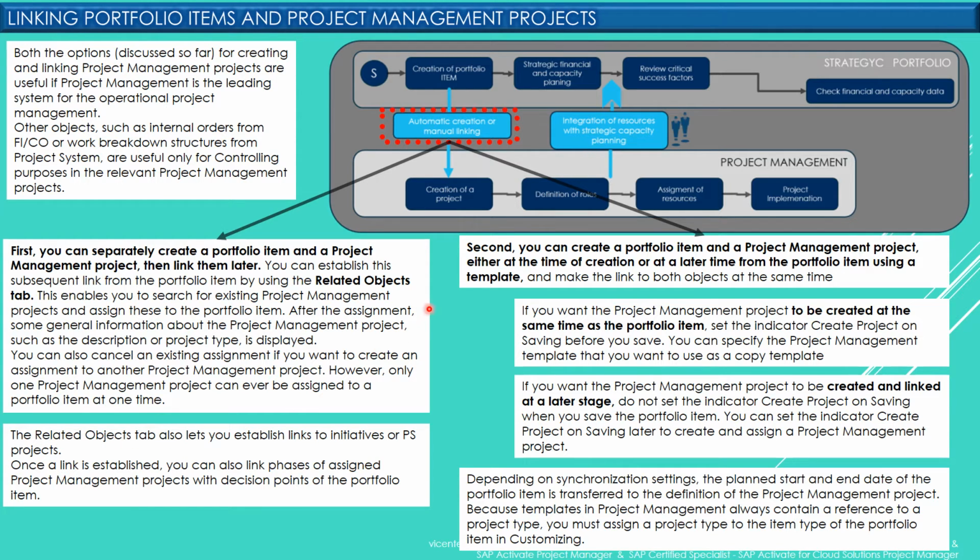The second way that we have to create this integration is automatically, but the automatic creation can be done in two different stages. The first one: if you want the project management project to be created at the same time as the portfolio item, then set the indicator Create Project on Saving before you save.